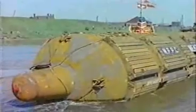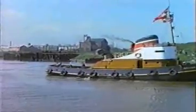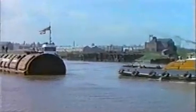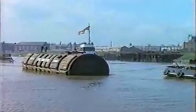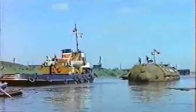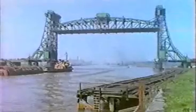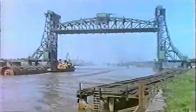They were designed and manufactured at the factory of one of our member companies at Thornaby on the northeast coast. Even as an empty shell, each boiler weighed 200 tons. They were 87 feet long and 19 feet in diameter. With such dimensions and weight, and also distance, road transportation of the boilers would have been a formidable task.